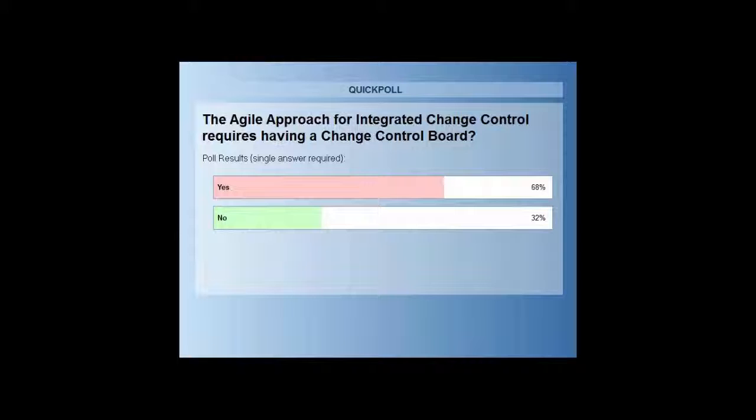Moving on to the close project phase, if we think about the administrative closure of a project, I think we still need to do that in Agile also, where you clearly need to see that the administrative closure and the production readiness or the final acceptance happens, and the contract closures and other stuff still need to be performed, and the final project is handed off. As you do lessons learned in the PMBOK, Agile also does what is called a release retrospective. So we still do a retrospective, project retrospective, or a release retrospective.